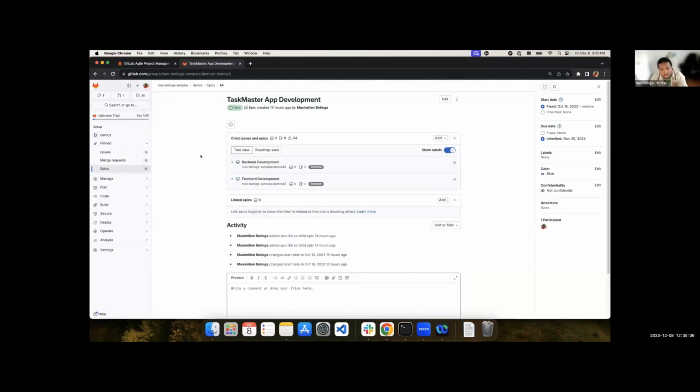A roadmap, as I said, is just a list of epics. And what is an epic, basically? An epic is a mix of multiple epics and issues. So you can have child epics, as you can see here, or issues that could be associated to a specific epic. The epic defines what we call a big chunk of work that has to be done as part of the project. Whenever we create these epics, we just need to assign them a start date and a due date. And that will draw the roadmap that you saw on the last screen.